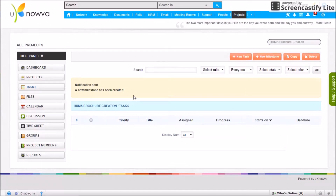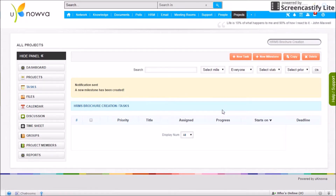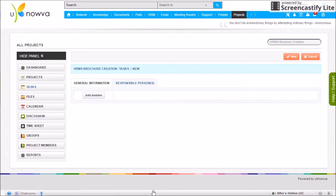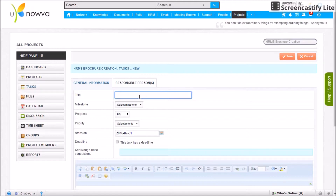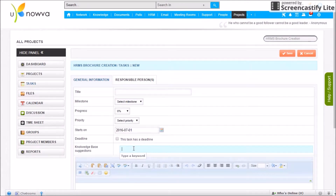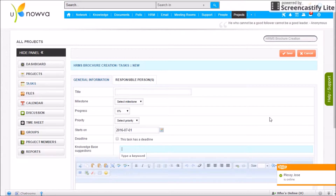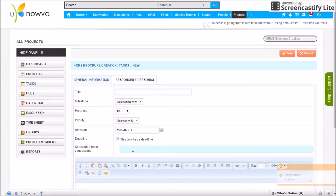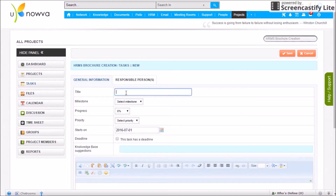A milestone is completed only when the tasks under it are completed, so let's add a new task. Click New Task to create one. You'll need to enter the task title, the milestone it falls under, the progress, priority, start date, end date, and a description. Knowledge-based suggestions let you link reference material from Unova's discussion forum to the task.